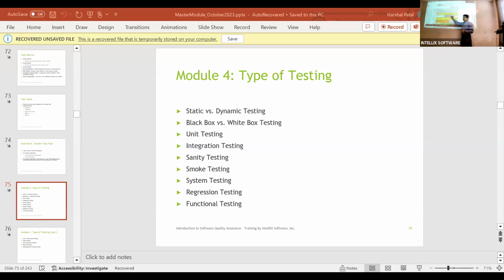So you come up with it, you put all of that data together, and the system that we talked about roughly takes about 67 days to test. When I convert 67 days into calendar weeks, it's about 13 to 14 weeks, so roughly 3 months. That is what it'll take you to test the R-phone system.